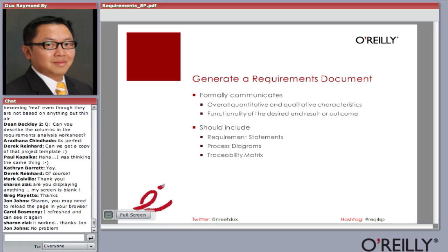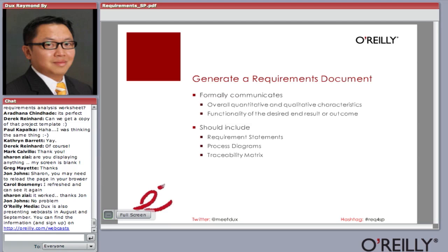That person should be able to look up and say, well, I'm buying these 2 things because it's a system requirement that supports user requirements 1, 2, 3, that support business requirement 1. That's what we mean by our traceability matrix. It should be able to question every single thing people are doing in the project, and it should go back to the business need you're trying to solve.